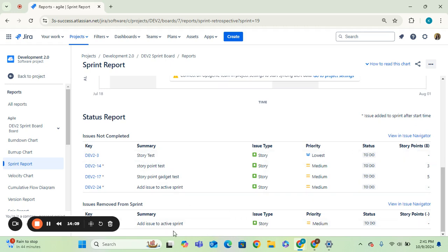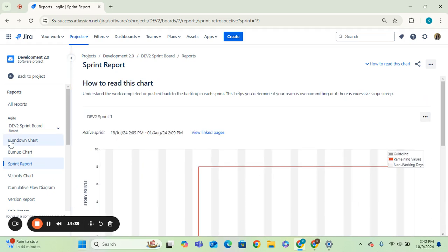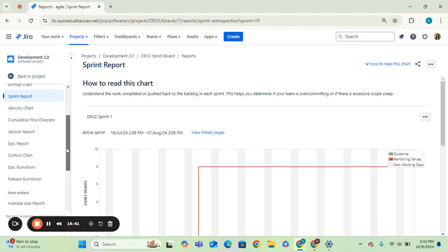And then issues that were removed from the sprint are listed here. So it'll show you things not completed. It'll show you what you did complete. And it's just a really nice view to be able to have a conversation with your team and say, well, I know that this issue wasn't completed within the sprint that we had originally intended on completing. Is that because it was more complicated and complex than we initially thought? And really just have some conversations about sprint reviews and how we can learn about estimating the work in a particular task. And so that's the reports portion of the left-hand widget.